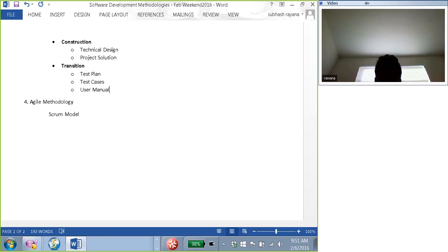Whenever a business change comes in, the architecture team, which is the design team, the development team, and the testing team are all affected, because every phase is being impacted, right? The architecture may change. The development obviously has to put in some effort. The testing team also has to document their plan accordingly. Even their plan will change, right? So it is a ripple effect on the whole life cycle, on every team. Every phase will get impacted. So you have to keep every team member in the loop whenever there is a change coming.